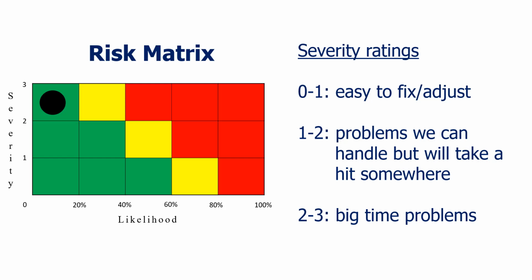Remember, for severity, we're figuring out where to put something on the vertical scale. So great, we've got the vertical scale, but how likely is that risk going to happen? Well, once we figure that out, we're going to move the marker to the right. Here, the risk I'm evaluating has a 75% chance of showing up. I get that probability from people on my team or that I know who have dealt with this before. And because I'm in the red zone, I am worried and I am losing sleep. So we'd better get into the risk mitigation decision making quick.